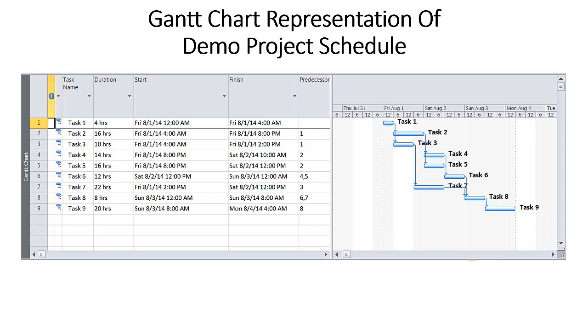You see the different durations. You can think about these durations as really being more work levels. This is the amount of work that's required. The actual duration of the task is ultimately going to be a function of what resource ends up getting allocated. And that's where simulation is going to help us quite a bit. It's going to give us an opportunity to play around with a fair bit of variability in the duration of each of these tasks, depending on different allocation policies and strategies we have.